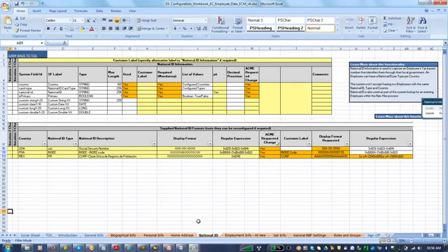Basically they have prioritized that certain fields have to go before certain other fields come in. Correct, that's right. Step one is foundation objects and then the employee data. It's very structured. We need to follow the same thing, and then do the implementation. If you follow the structure, I think we can do a very good job on the implementation side.